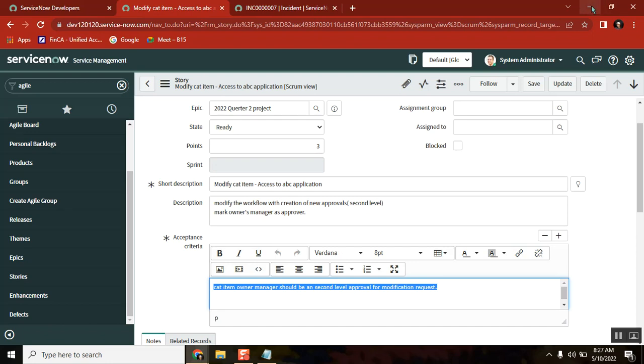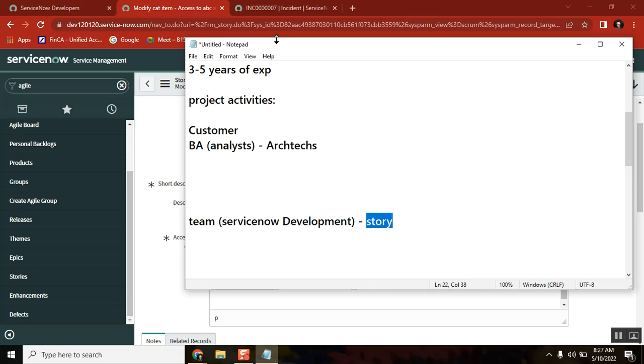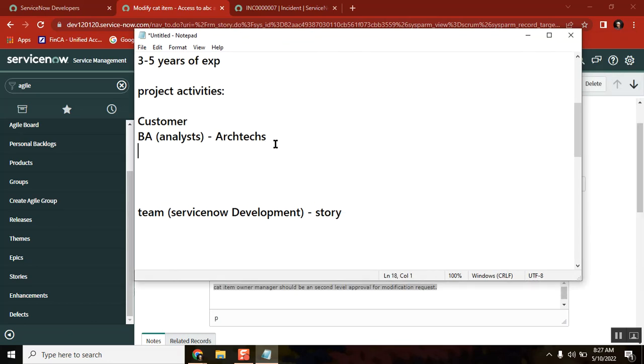So here, when we say story, we will be having some window, maybe a 2 weeks window. We will call it a release or sprint, whatever you call it. 2 weeks, that means 14 days. Suppose we have 5 people in the team. The architect, team lead, or delivery manager of the team will check how many stories the 5 people can develop. The customer has given a project of 3 months scope, and this 3 months project is divided into maybe some 45 stories.